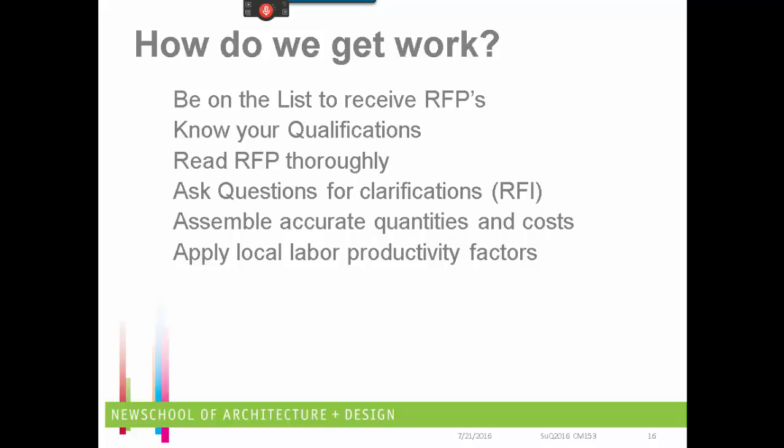Now, overhead is the cost of doing business outside of this project. In other words, your superintendent, your foreman, your trades, your materials, your transportation, all of those issues are cost of the project. But your administrative, your executive, your office space, your estimating, all of those elements are your overhead that are not dependent on the particular project. So you've got to determine what the overhead requirement is for you.